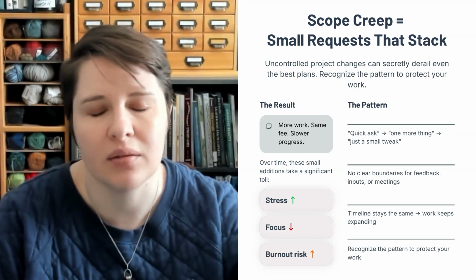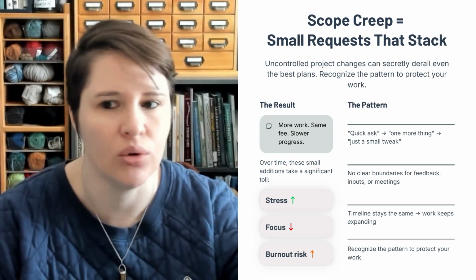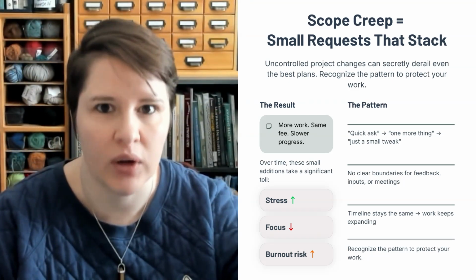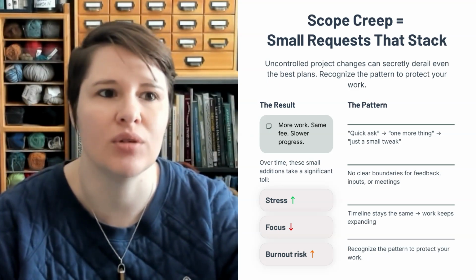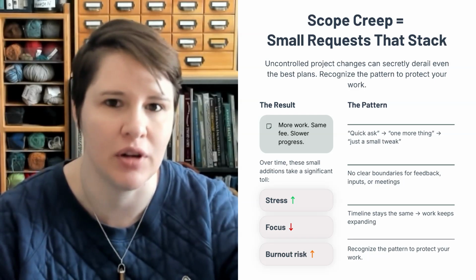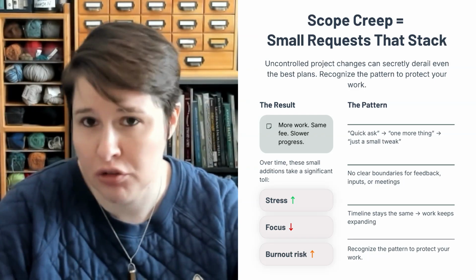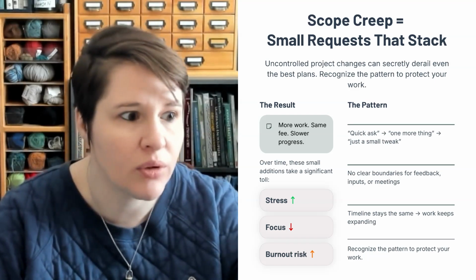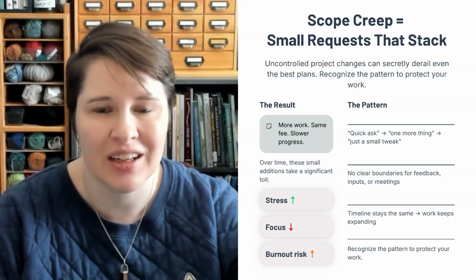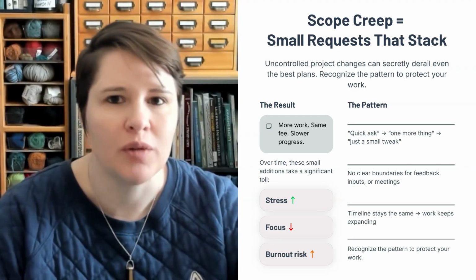Or sometimes it means that your one planned kickoff call turns into weekly meetings, and suddenly you're getting all kinds of quick questions via email, and you can't actually focus on the deep work that you need to do because you're trying to keep your inbox under control. None of these individually are that big of problems. They're small requests, they're entirely reasonable. But as they add up over time, they start preventing you from doing the work that you actually need to do. That's why scope creep is so sneaky.